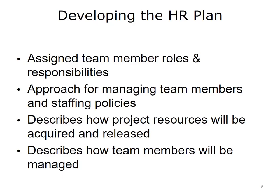At the point of developing the HR plan, it is essential to identify and describe the types, quantities, and timing of the resources required for each activity in a work package. TAP University states: 'To document the roles and responsibilities in the Human Resource Plan, the organization's organizational charts and position descriptions are used. These outline reporting relationships. Networking, in order to know more people and to know people better, is especially helpful at the beginning of the project when people are being selected for the team. Having an understanding of how people work together and how they are motivated is also helpful in putting together a good team.' Having a basic understanding of organizational, motivational, and group process theories can be very valuable during HR plan development.